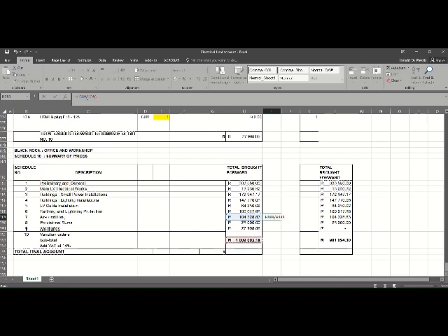Okay, and what I'm going to do is I'm just going to take out the P's and G's, because the P's and G's is worked out as a percentage. Okay, so it's 15% of the total estimate that the air conditioning actually contributed to. So we know that we can take out 15% of this, times 85 divided by 100.